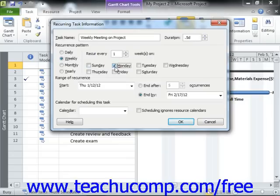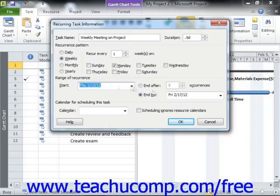Next, in the Range of Recurrence section, enter the first start date of the first instance of that task. Then to the right of that, set the ending date, or select the total number of times that you want the task to occur.